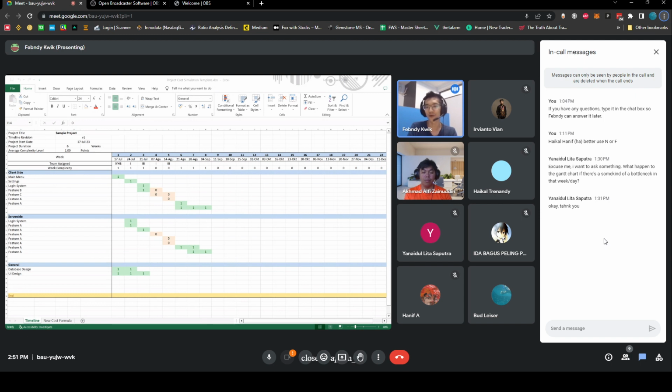As project managers, for Alfie, for Ivianto, what you're going to be doing is making sure that the whole team always has something to do. If they don't have something to do, like, okay, crap, there's a bottleneck, there's nothing else we can do on this project, then you can take a look at the other projects first. Do we have any other side projects, or any other things that we can do? Let's move them to that project first for 1 or 2 weeks, make sure they don't overcommit there, and they can leave at any time for that project, and then take them back once the bottleneck is resolved. I think that's the best solution for things that can't be salvaged.